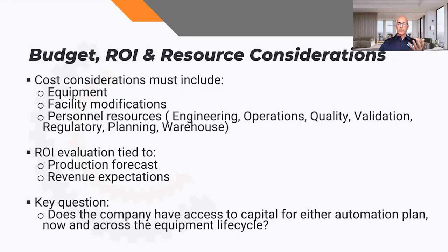Of course, anytime you go from one process to the next, you may have to do a regulatory assessment, and that's going to add some time to the release of the product. And then going into the planning group, there's going to have to be more parts coming in, more parts going out. Do you have the warehouse space? At my old company, there was no warehouse where we were, so they had to go almost all the way down the border for increased warehouse space. So that's a huge cost concern attached to full automation.